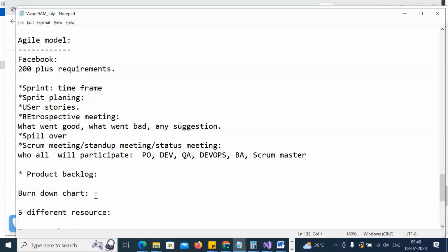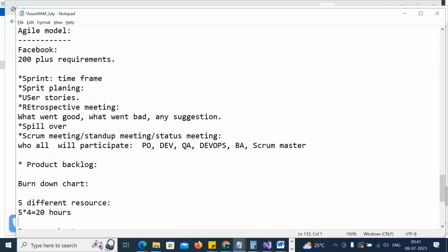Okay. Very good. So let's see that we have 5 different guys working in your project. 5 into how many hours daily? Real one, 4 to 5. Let's see, I'm considering 4 hours only. So daily we work for 20 hours, right? Yes, no? Very good. Let's imagine that out of 5 guys, one guy is absent for the complete week. It happened, right? So based on that, we'll calculate their task and then we'll pull the user stories from the sprint planning. Do you get the point?